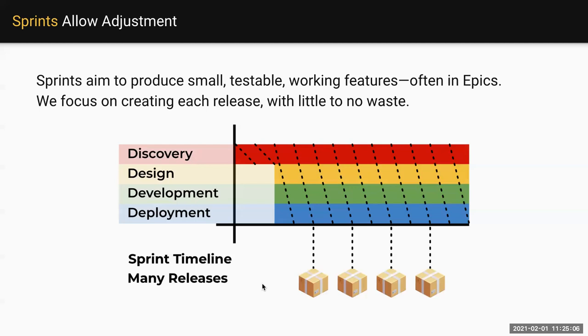So you start off with the most important and most foundational things first. Maybe it's, you know, landing pages, basic pages. Then maybe you get to the blog and maybe you have an event calendar. And then maybe you have some educational programs or something like that. What if midstream, before you really get too invested in maybe the events or the blog, the client says, well, you know what? We saw this third party. You know what? We're going to put the blog over here. Or maybe for calendaring, we're going to use this third party system for that. Just link out to it. Well, if you haven't even done any discovery work or design work or building work on that thing, you haven't really wasted anything.